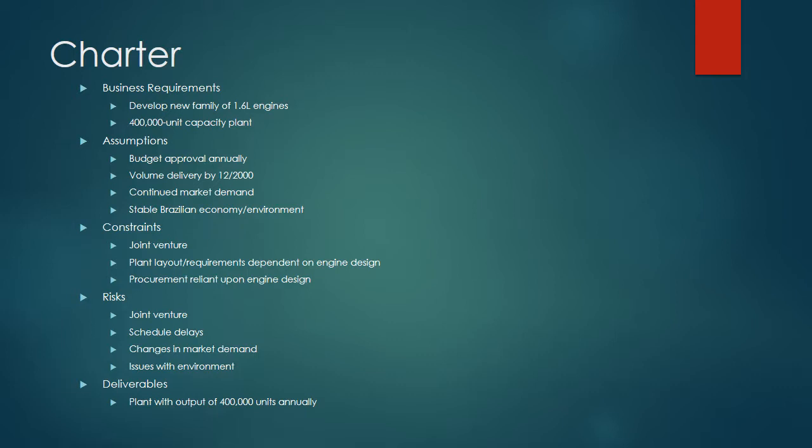Some constraints: the joint venture itself was definitely a constraint. Decisions required collaboration, they couldn't be unilateral. Important decisions were subject to the unanimous approval of a steering committee made up of members of both BMW and Chrysler. The plant layout and requirements were dependent on the engine design, so any delays in the engine design would delay subsequent phases. Same for procurement.